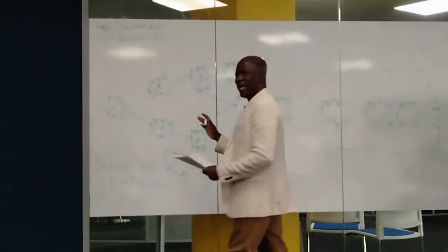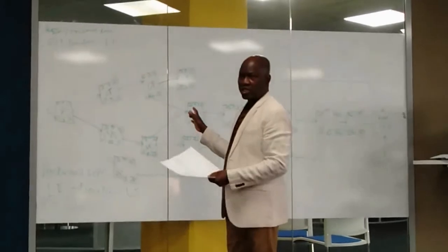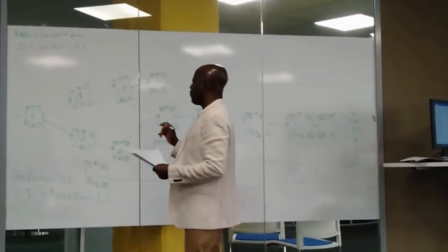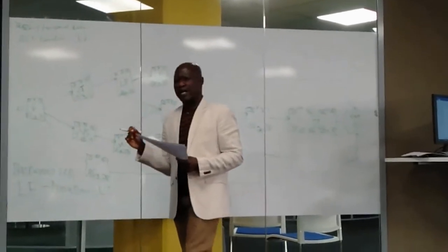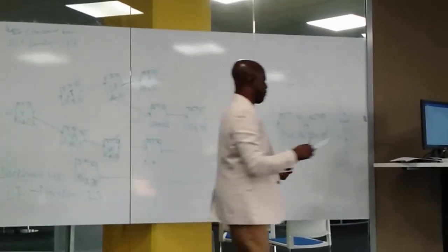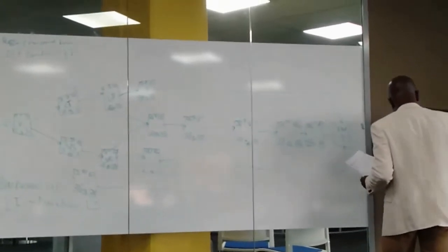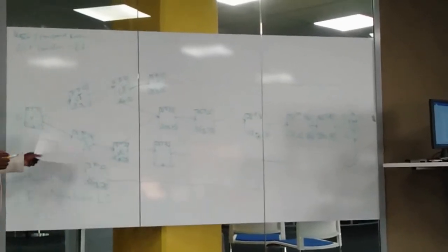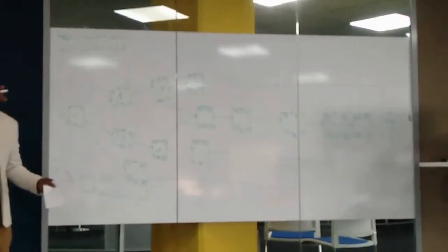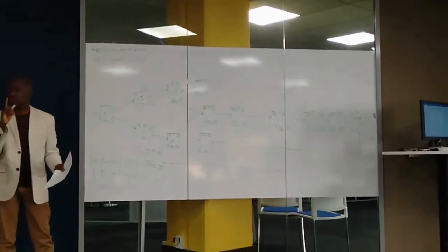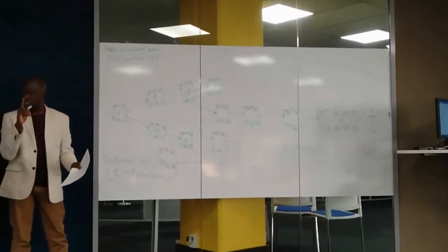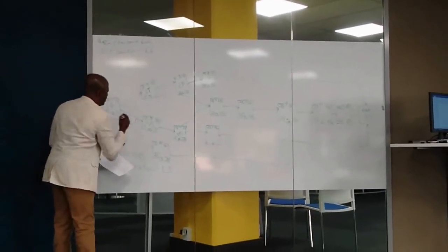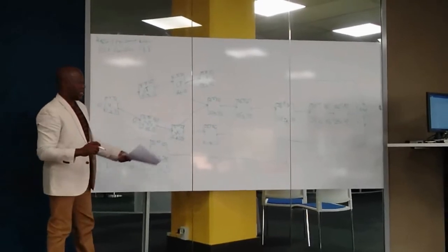I think it's clearer because you said you wanted a practical example. It should be clearer now. Now, the point is this: if we really wanted to get our critical part, how do we get it here? We look at these items and see, when we minus them from each other, anyone that gives us 0. Do you understand? Now look at 3 minus 3, 0.